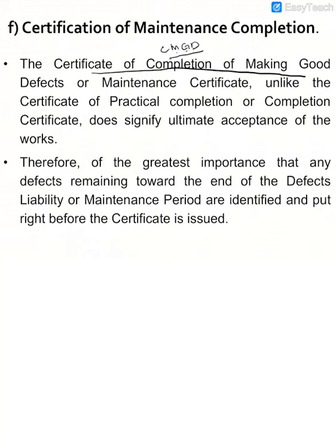Therefore, it is of the greatest importance that any defects remaining towards the end of the defect liability period are identified and put right before the certificate is issued. So before they issue the CMGD, they have to make sure all the defects have been repaired.